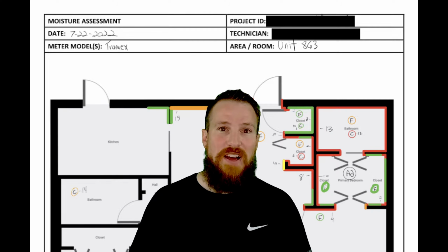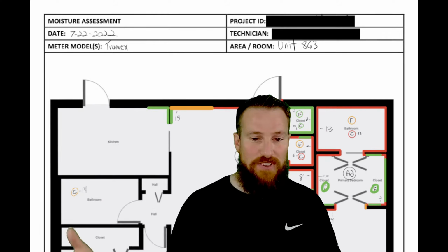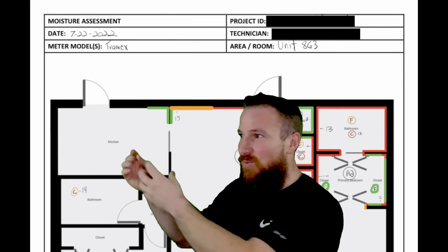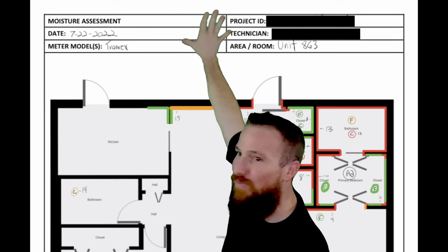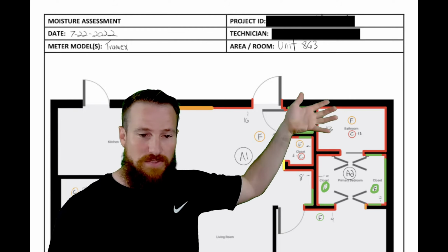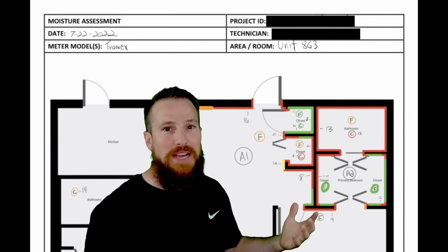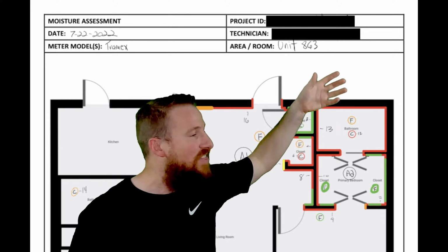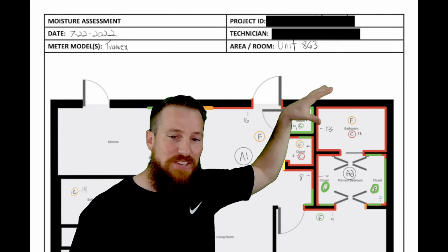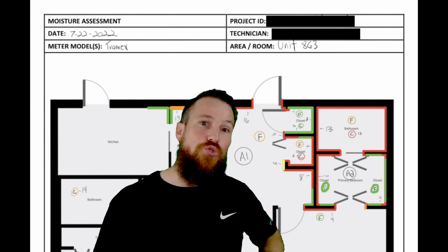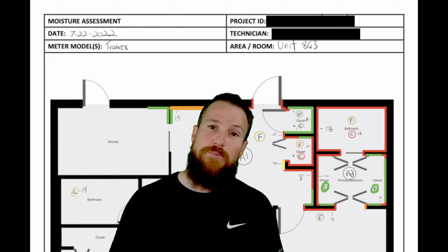Now, as a remediation contractor, documenting these findings day in and day out, you're going to see, once I figure out which side of the wall I'm on, I don't know how these weathermen do this, right? We've got a warm front, cold front coming in. But anyway, you're going to see over the course of a 3 to 5 day period, depending on your drying times, and they can vary. You can have things dry overnight. It might take 7 or 8 days to get things dry. But you're going to start to see a lot of these reds turn to oranges, turn to yellows, turn to greens.